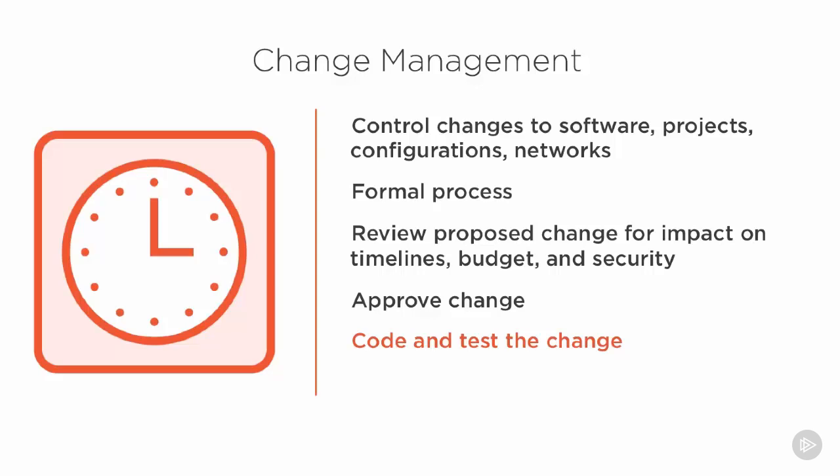Once it's approved, well, we make the change, code the change, test to make sure it works correctly, and then, of course, pending the approval of that completed change with all the testing completed, we will then schedule this change to be implemented. And this, of course, should be done at a time which is convenient for the organization.